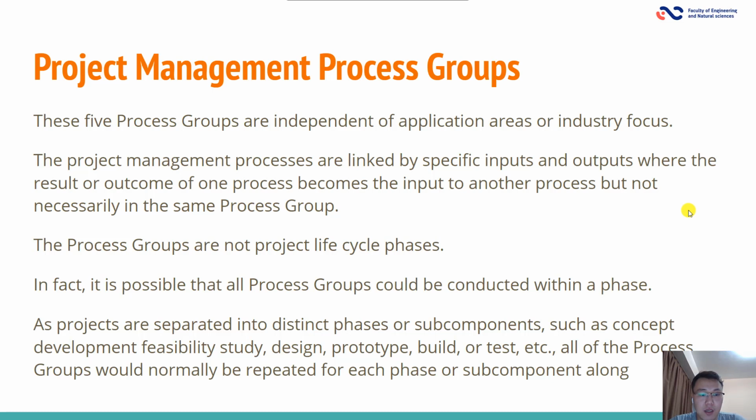As projects are separated into distinct phases or sub-components, such as concept development, feasibility study, design, prototype, pilot, or test, all of the process groups will normally be repeated for each phase or sub-component.